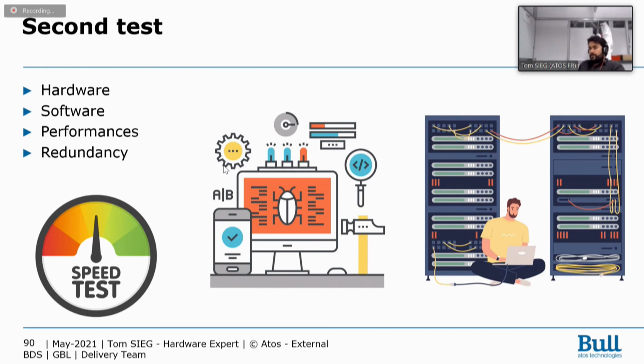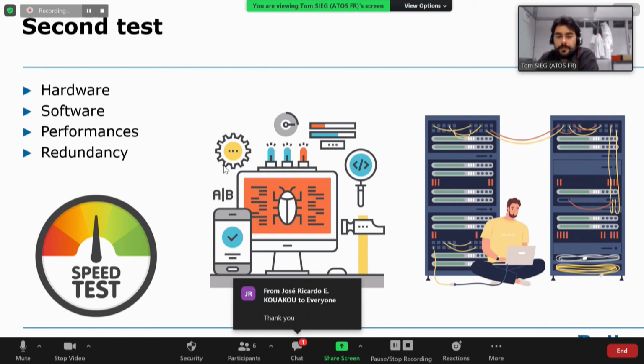So when we do it at the factory, we do it with a quick software solution. And when we do it on the customer site after the installation, we do it with the final solution, so with the final config, and we are pretty sure we reach the performances we will reach on the cluster. And we are sure of the hardware, of course. You're welcome.